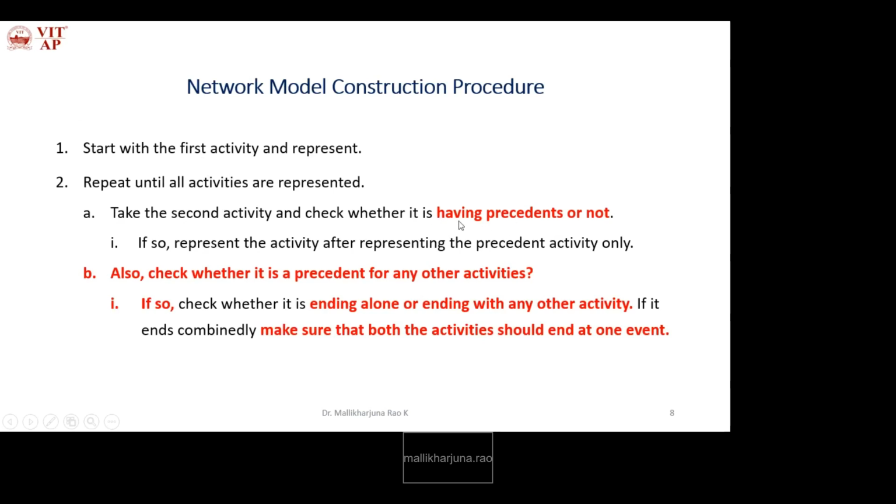At the same time, while representing the second activity, also check whether it is a precedent for any other activities in the list.